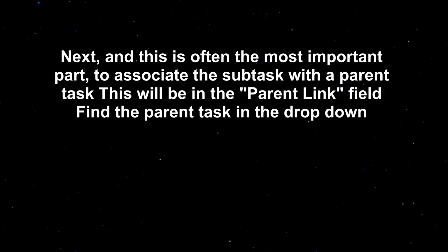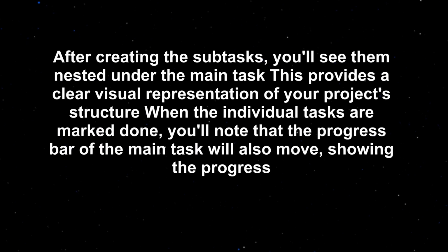Next, and this is often the most important part, associate the subtask with a parent task. This will be in the Parent link field. Find the parent task in the drop-down. After creating the subtasks, you'll see them nested under the main task. This provides a clear visual representation of your project's structure.